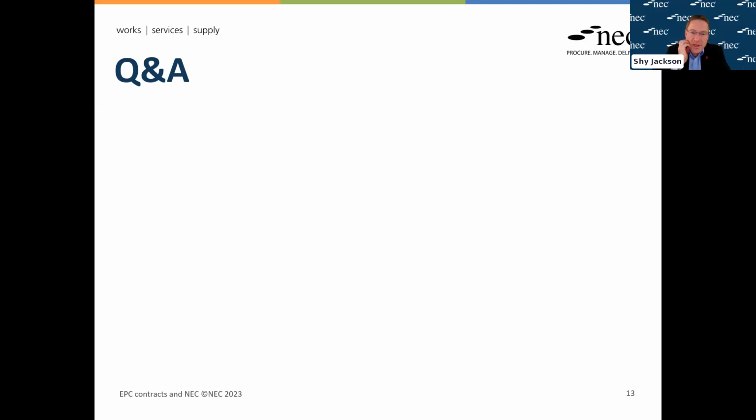I think there's a question about EPCM, construction management, as compared to option F, which is management contracting. Yeah, and that's always a bit confusing. So the way to think about it, in practical terms, it's quite similar, but contractually it is different because under construction management, as I've said, the client will enter into direct contracts with the various members of the supply chain, as well as a contract with the contractor who manages everything. Under management contracting, the client will enter into a contract with the contractor who manages everything, but then it's the contractor who will enter into the various contracts with the members of the supply chain.